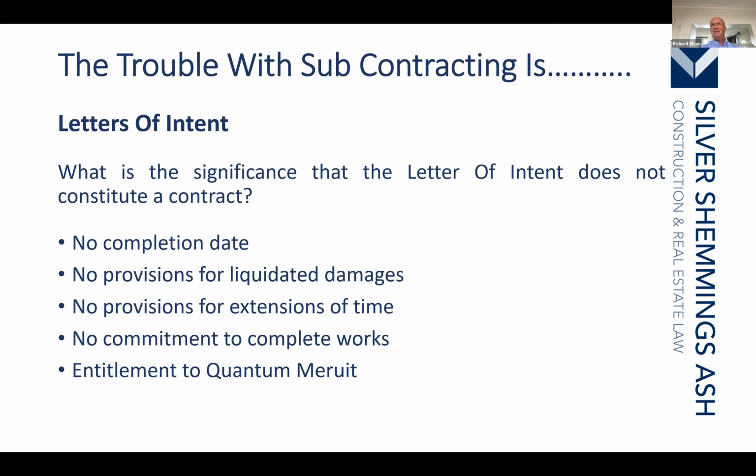But rather than placing the subcontract, because the main contractor hadn't received a contract, they'd issued a letter of intent to the subcontractor saying, it is our intention to enter into subcontract with you. We shall, at some time in the future, be placing a contract with you. But in the meantime, proceed on the basis that you carry out the works up to £1 million.